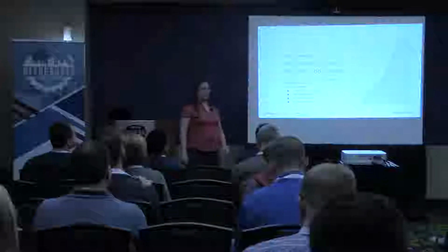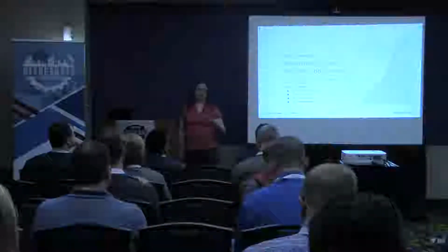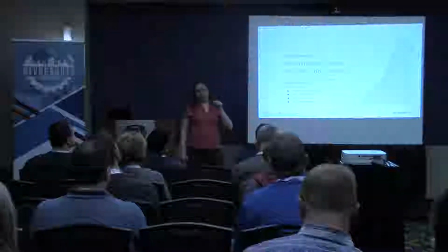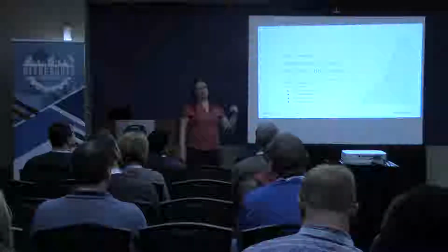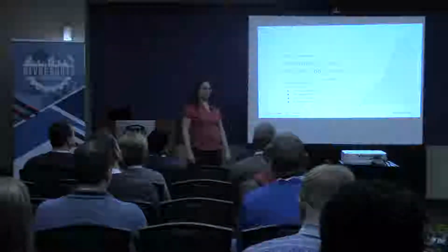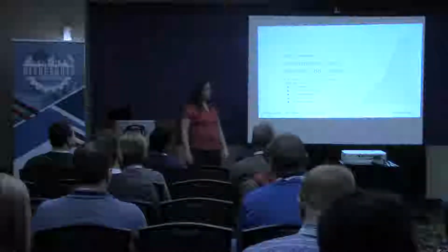And there's lots of consumables you can be looking at here. You've got disk space, of course, cloud provider budget. Because if you're on Azure or Amazon and your monthly spend is creeping upwards and you're only allowed $20,000 a month, but your last 3 months are getting closer and closer to that line, that tells you, the manager, that you need to either beg for more budget or push for some downward pressure on your costs in some way. So that's a consumable that you can use in this wonderful new public cloud environment we have.